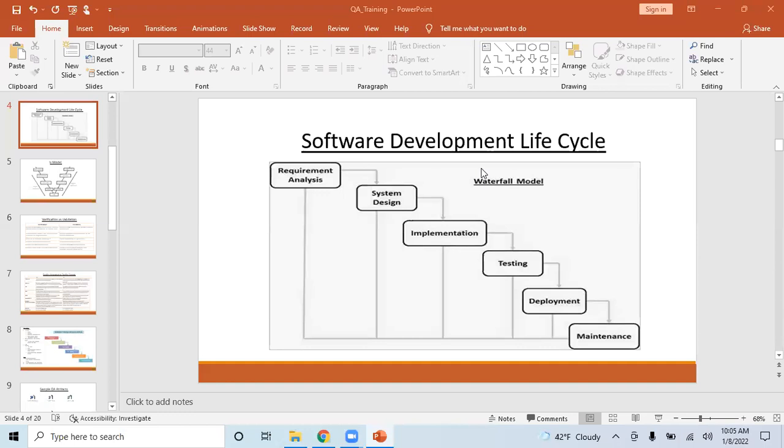Anything that needs to be tracked, so that it will affect the project timeline, needs to be part of Jira so that it can be tracked to closure. There should be an assignee to the ticket, and project managers will keep tracking those tickets to make sure that the work is being done on that particular task. So anything that needs to be tracked to closure is part of Jira. And if something is just for knowledge base and need not be tracked, those parts are on a Confluence page.